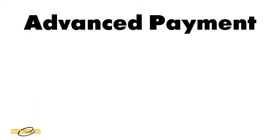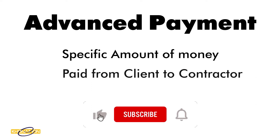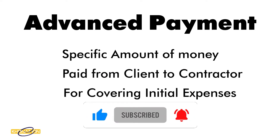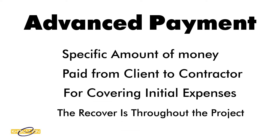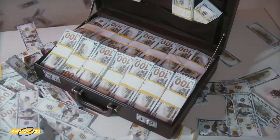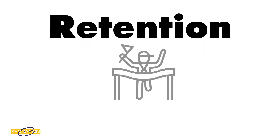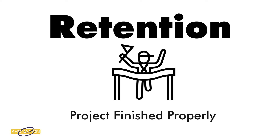Advanced Payment is a specific amount of money that is paid from client to the contractor to cover initial expenses, and will be covered in next interim payment certificates. The purpose of retention is to ensure that the contractor properly completes the activities required under the contract subject conditions.